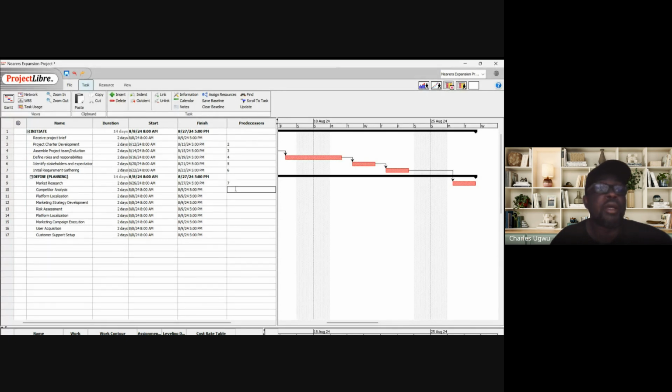So number 9 needs to finish before number 10 starts. You see number 9, and then number 11, before we start number 11, we need to finish number 10. We add number 10, and then 11, 12, 13.